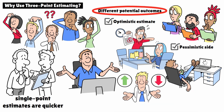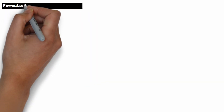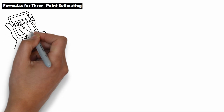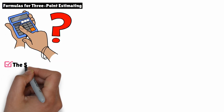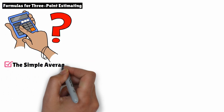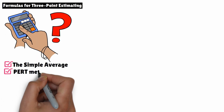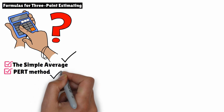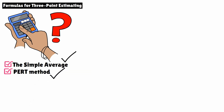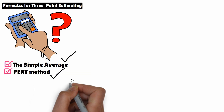Now let's talk about how to calculate three-point estimates. There are two commonly used methods: the simple average and the PERT method. Both of these help you arrive at an expected estimate, but they weigh the different scenarios slightly differently.